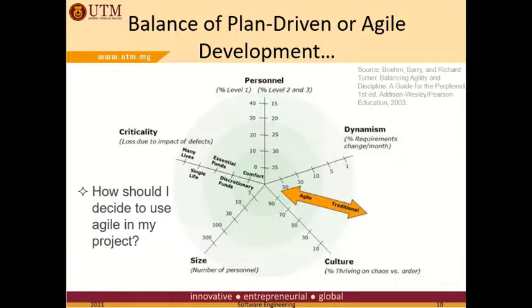Method selection is based on an assessment of agility-oriented and plan-driven risks. The risk associated with an inappropriate choice of project methodology is reduced by first assessing project factors to determine how well the project fits with either the agile or the plan-driven method.